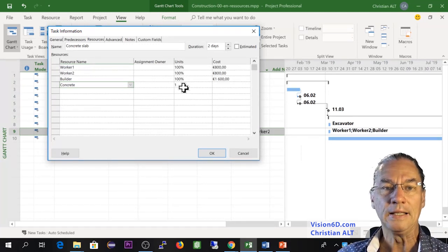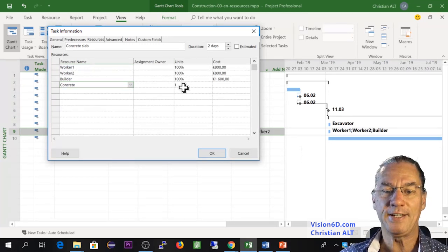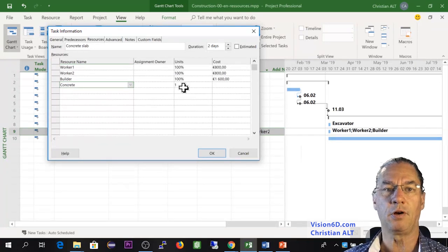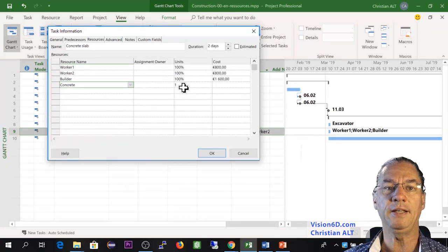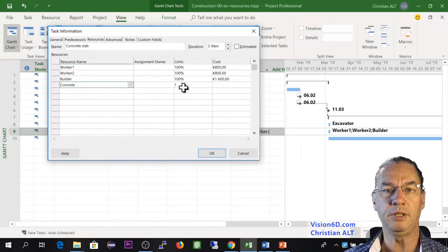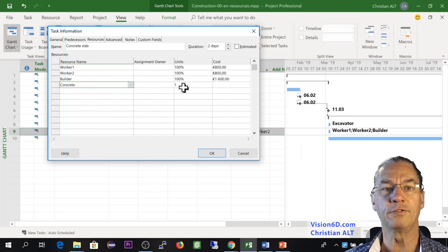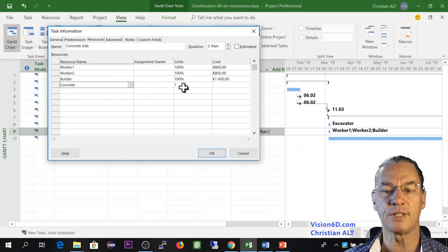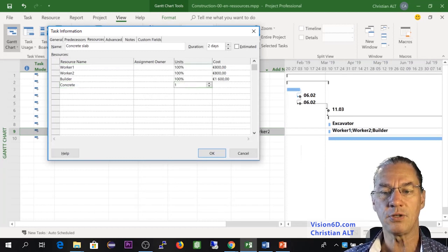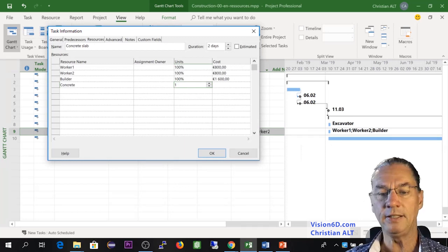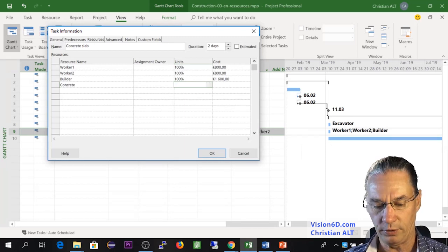In our case, what we are doing, it's a basement of about 80 square meters. And for this, we'll need 12 cubic meters of concrete. So I'm going to say here that I need 12 units.